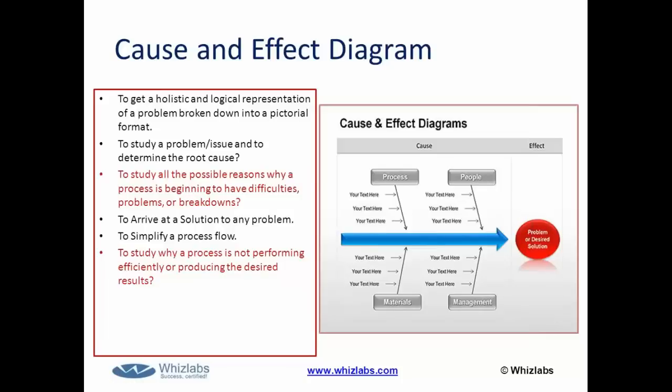This is what you need to find out during quality planning: how can people affect the quality of your project. So try to identify people related problems, like skills. They are not skilled to do the work to which they have been assigned. Whether they are working overtime, working on 2-3 projects simultaneously, that can be a quality problem. Same way, identify the processes, which are the best quality processes, and how an incorrect process can lead to a quality problem.